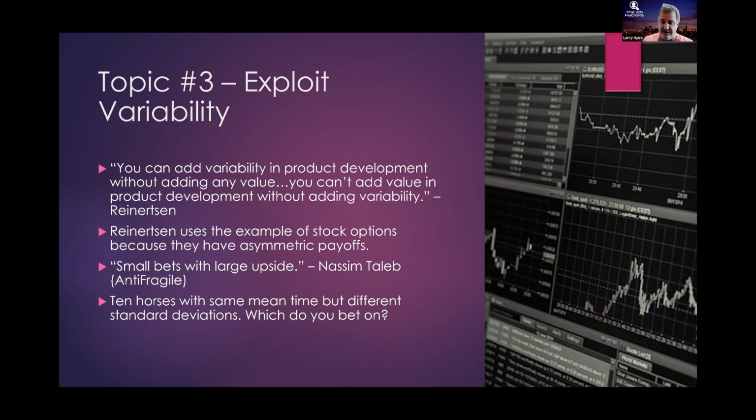I used to have a product owner where we would spend the 2-week cycle refining the work at the top of the backlog. And then the day before sprint planning, she would come in and bring in 10 new items and say, you need to work on these items. I said, we can't do that. She said, why? I said, because we haven't refined them. We don't know the work. We're not going to be able to do the work very well for you. The quality will suffer. We need to spend a little bit of time understanding it. She said, but we're agile. We can do anything. That's not the definition of agility. Agile is not chaos.